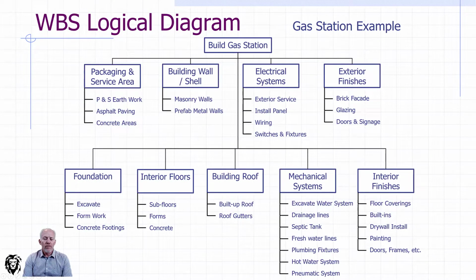So where are we starting, right? We're not starting from scratch. Project planning has been going on for a while now, and recall that we have our work breakdown structure. If we go way back and we talked about the flow through planning, we know that the work breakdown structure is the feed in or the lead in to scheduling. And so I just throw this up for visual sake. This is a work breakdown structure tree that we talked about when we were talking about work breakdown structures. And so this is our starting point.